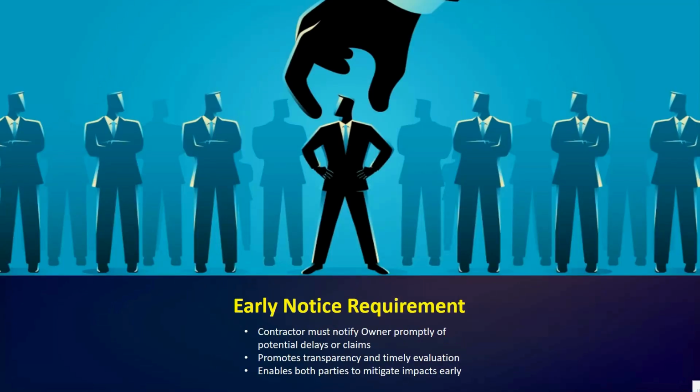So next we have the early notice requirement. Another key element of ConsensusDocs is the early notice requirement. This means the contractor must notify the owner promptly when a potential delay, change, or claim situation arises. So early communication promotes transparency and proactive problem solving.